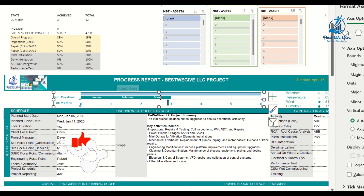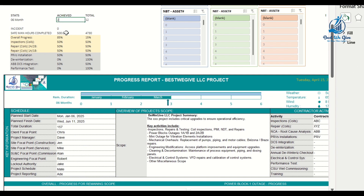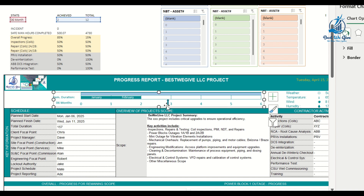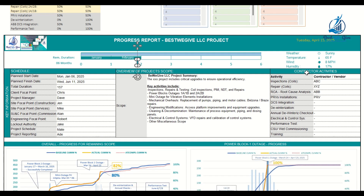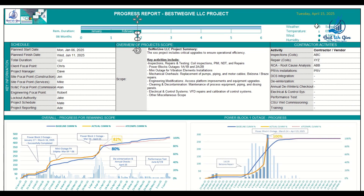If you want six months, you can put it back to six. Now, let's say two months of a six-month project have passed — you come to the top, make that change to show two months, and you can see the timeline reflects two months here at the top. That represents the length of your project from start to end, coming from your schedule.